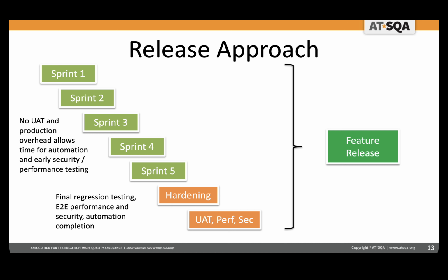And this is a logical set of software, so that when it goes out to the users, they only have to do UAT once. They've got business transactions they can run against it. They only have to deal with the deployment once, and that makes it easier for everybody and much more predictable. Whereas in the previous sprint model, we tend to have chaos towards the end because stuff isn't getting done. Things are not getting completed within sprints. Everything's beginning to slip, and we're picking up a huge amount of technical debt. And that's got to be addressed somewhere.